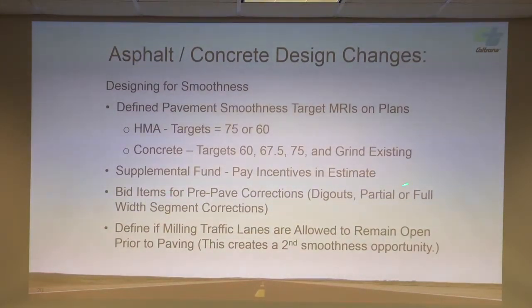Supplemental funds are going to be put into the projects to pay the incentives. So there's guidelines in the standards in the SSPs, based on the lane miles, for them to put supplemental funds into the estimates. And there's bid items for pre-paved corrections, which are dig outs, partial or full width segment corrections.